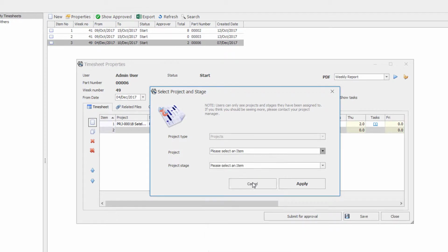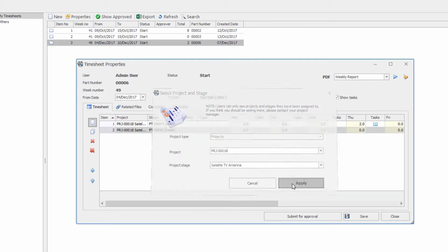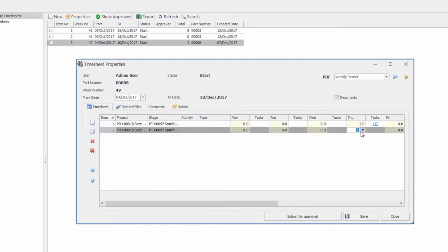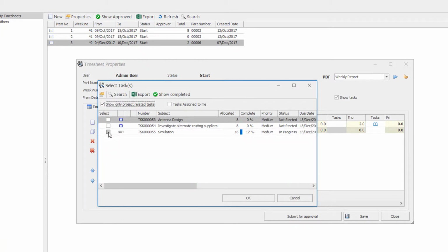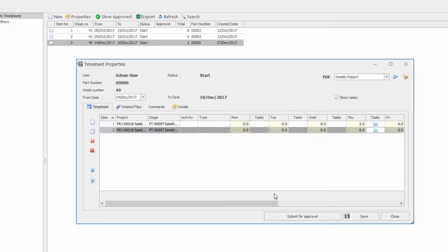To track the status of our projects, project stages can be modified by updating the percentage complete in the stage, or can be driven by my team through the use of timesheets. The team can select the project task they are working on and log time directly against it. This provides a powerful way of getting an actual value for time spent compared to estimating time. This also ensures you have visibility to whether a product is still on track for delivery.